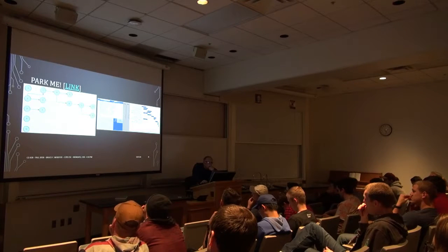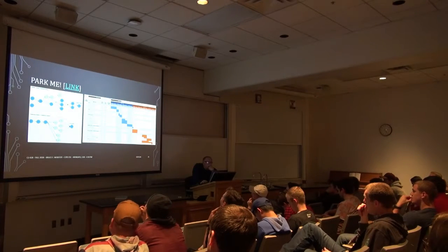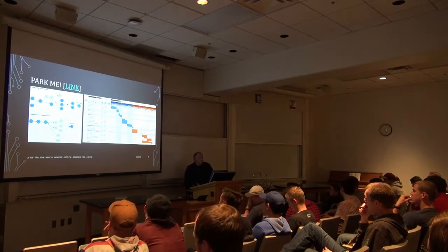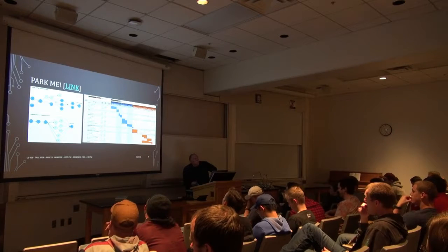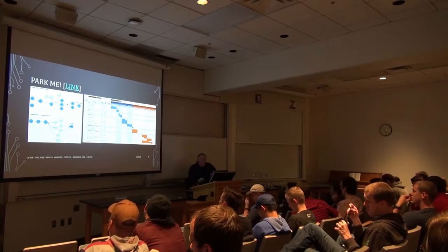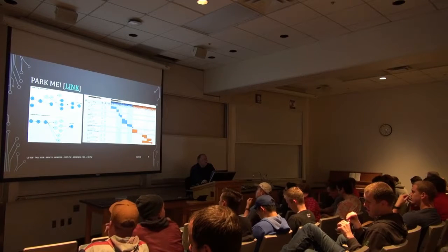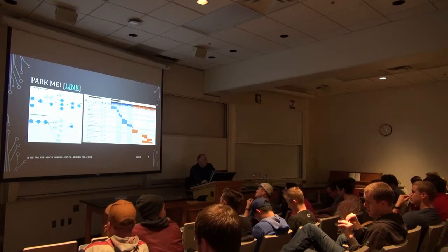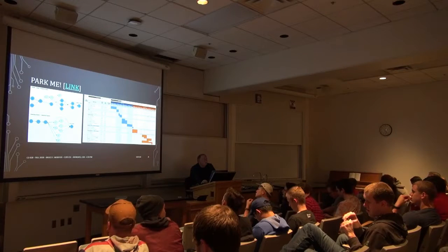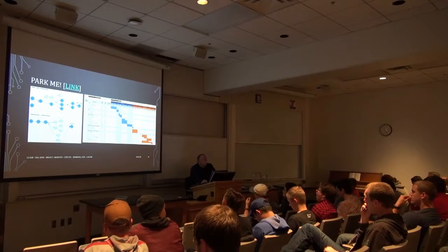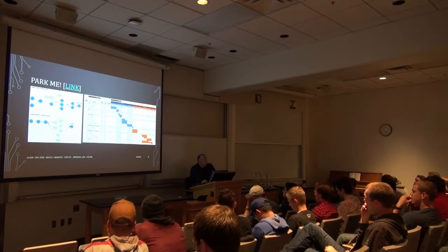So yeah, that's that. The only question I had on your diagrams, and these actually all look fine, is what dependencies are there between front end and back end? Because I assume they actually do have to integrate at some point. They do have a dependency. It's going to be the API definition, and one of the first things that back end is going to do is write a dummy data generator that will pass back hard-coded data in the shape that the front end expects, and then both front end and back end will work off of that assumption.